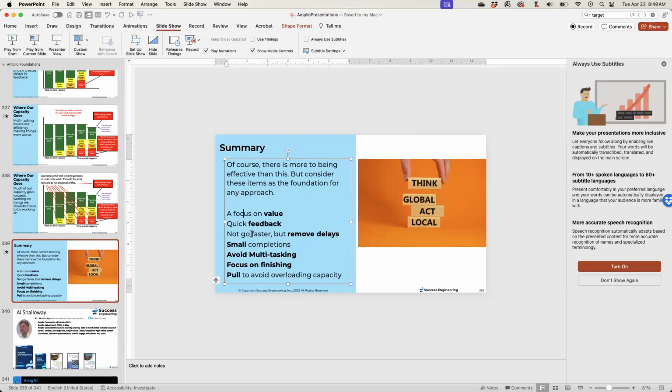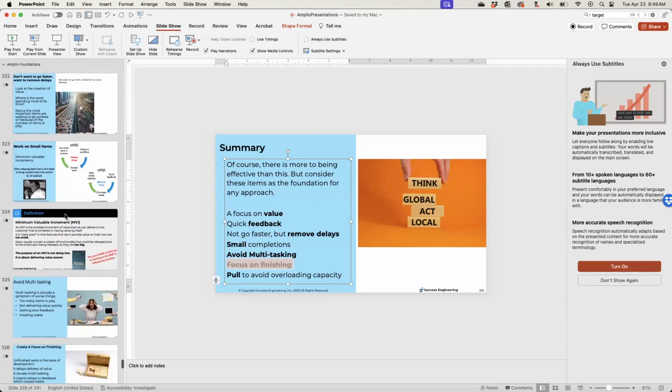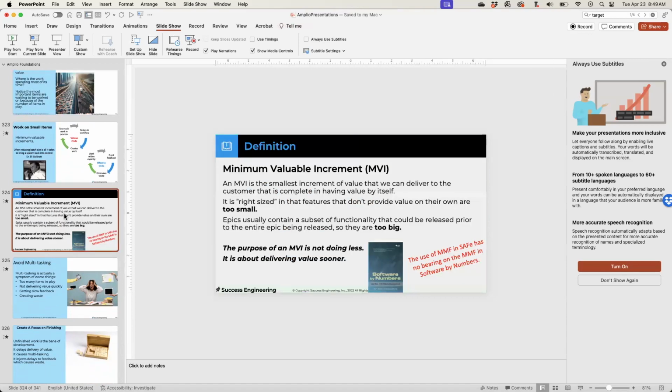So how would you move forward with this? Okay. So one thing you could do right away is a focus on finishing. Part of this could also be where I talked about starting. The MVI concept is something that's actually pretty typically easy to implement, regardless of how things are, because you say, okay, we got this big thing. Okay, well, what can we deliver next? Now, I'm not saying management will agree with you. Okay. In other words, let's say they've given you this 4-month project, and embedded in that 4-month project is something that can be done in a month.